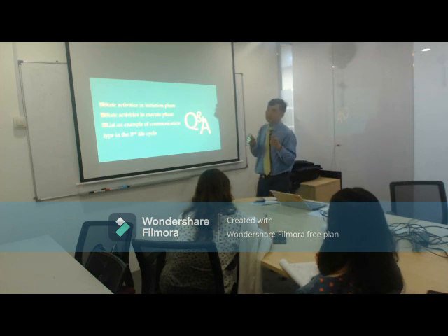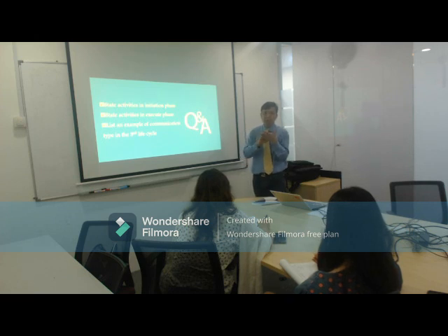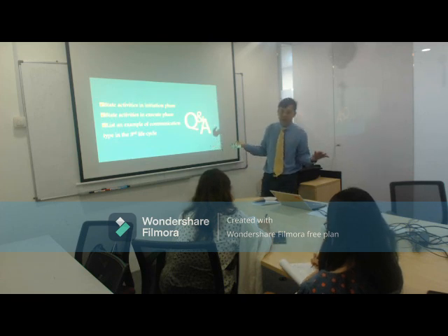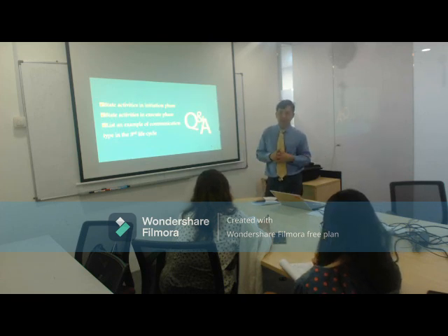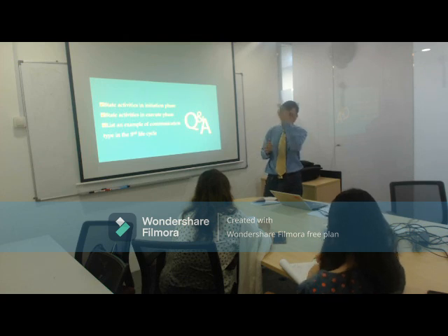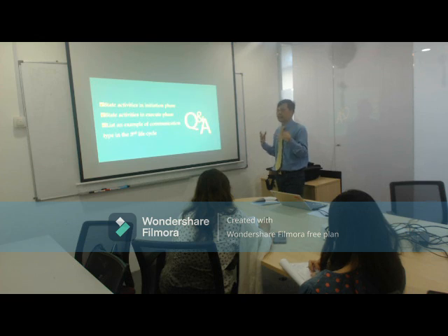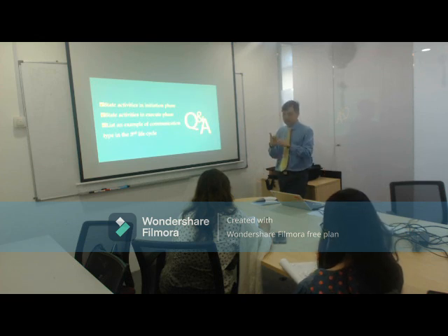So for the feasibility study, I would have listed out all those things. Then I see, okay, which one can be done. From that feasibility study, I will come up and say, oh, I can only do painting because that's all my budget is. Right, so that's the feasibility study. So I will put in everything I want to do and determine what it is that I can actually do with this TCQ.